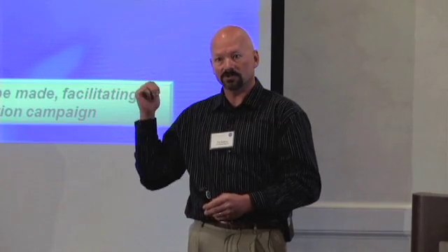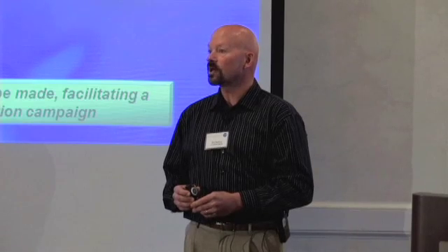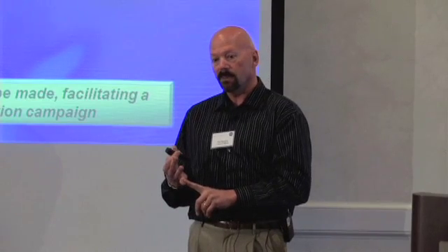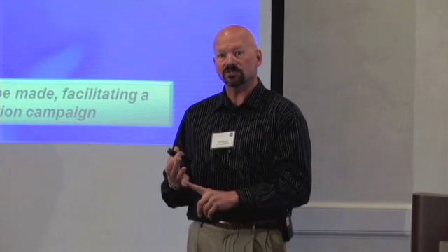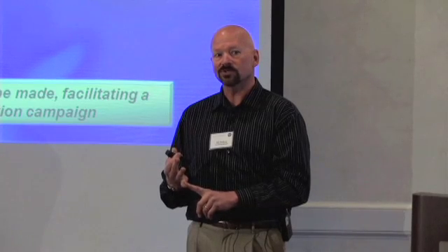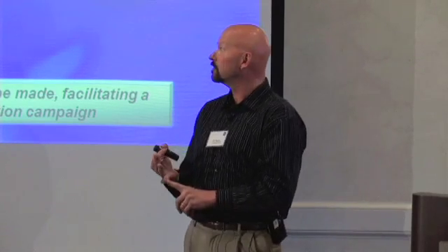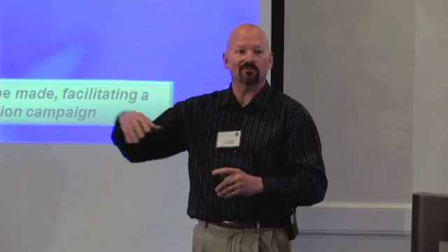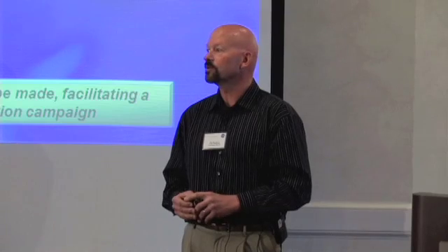So these work-to-go audits are something that, about the time that you're ready to start environments, your leads ought to be able to figure out, okay, what are all the tasks that are still on my list? Yeah, I've got this earned value plan, but I need to know what's the full list of things that you have to do, and how much labor do you think it's going to take to finish each one? And it's kind of surprising the results you get from that. You find out that your telecom system, for example, oh yeah, I've got all that stuff on my plan, but you know there's 18 other things that never made it onto my plan, and I hadn't really thought through the budget to get that done.